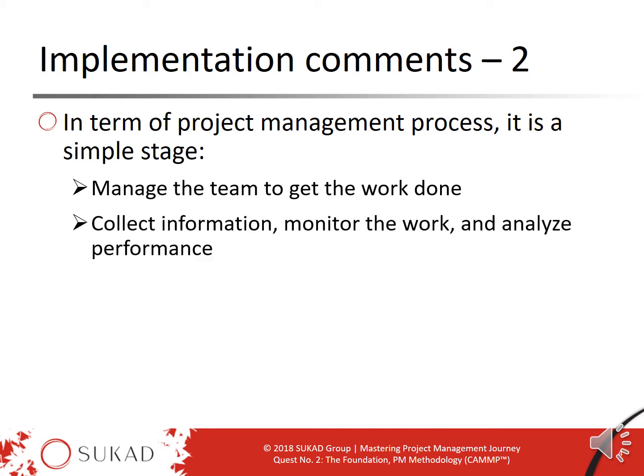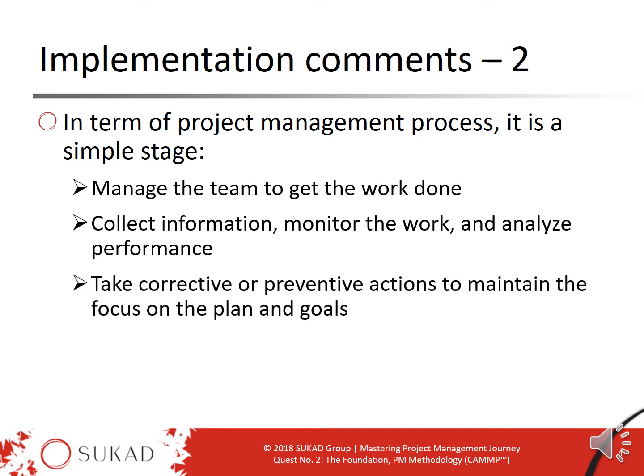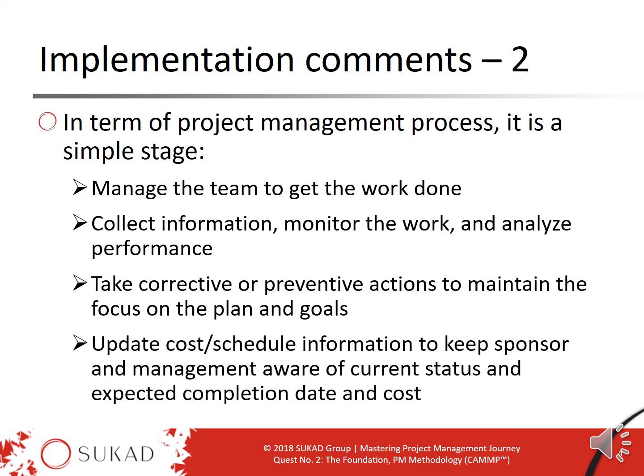During the stage, we would be collecting information, monitoring the work, and analyzing performance. Some of these terms I'm using here, monitoring the work and analyzing performance, are typically part of project control, which is happening from the time we have the idea approved. Technically, control is ongoing throughout the project and in every stage. However, because most of the money, effort, and quantitative work is being done in implementation, control becomes highly critical in this stage. In this stage, we might have to take corrective actions or preventive actions. And the primary focus is to keep focus on the plan and the goals that we need to achieve. As we go through this stage, we are likely to update the cost and schedule information to keep the sponsor and management aware of the current status.